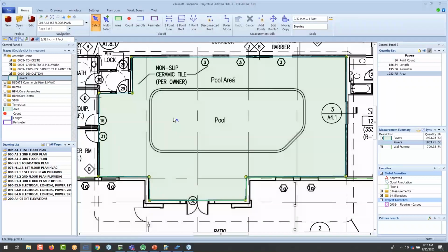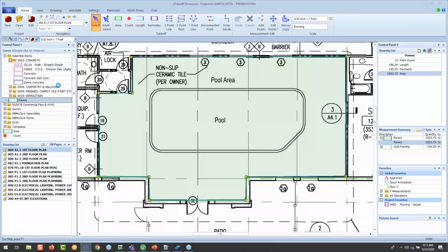Our estimating system, of course, when we look at that, we've got assemblies, we've got items, and they all have, well, not all of them, of course, but we have variables that would be associated with that. So if you look at concrete, of course, we're going to order concrete in cubic yards, but we're going to take it off in square foot. We need a calculation along the way. We need to be able to enter that depth. So with that being said, we come over here.